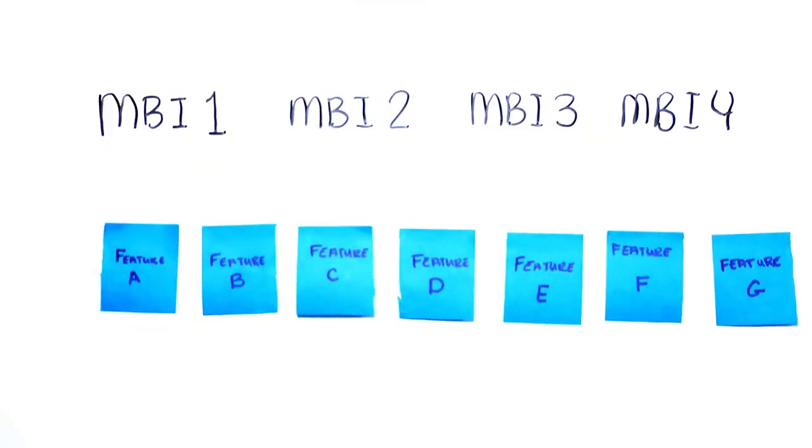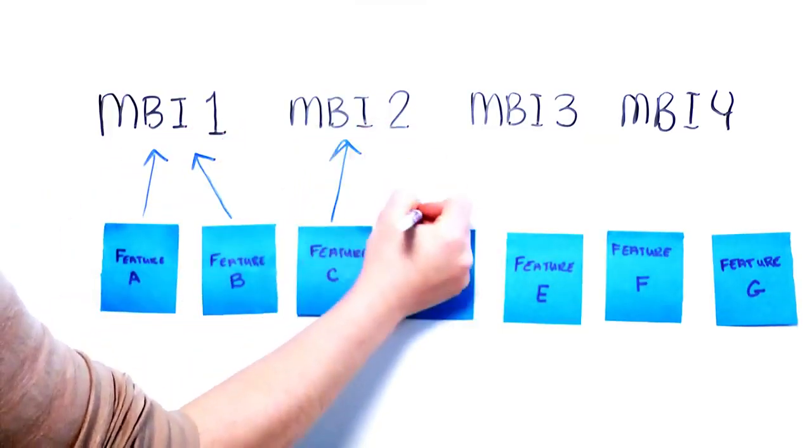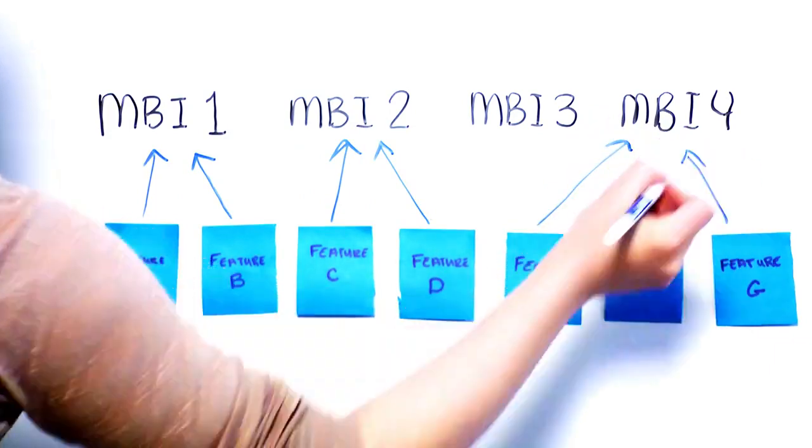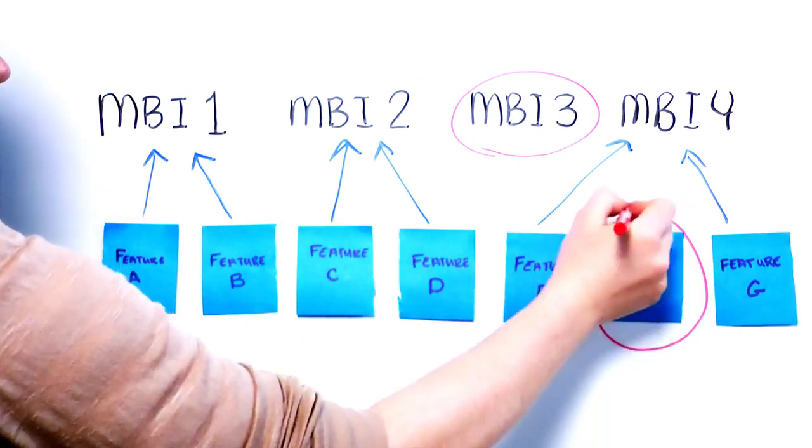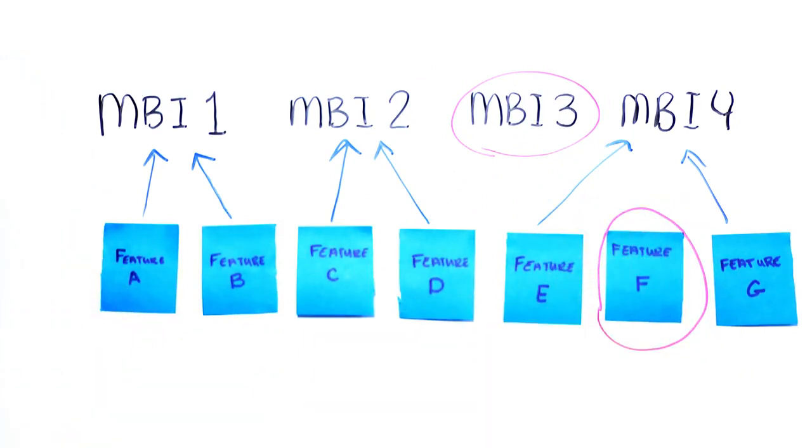We discovered a few gaps. There were MBIs without features, there were features without MBIs, there were features which were far too large, and features that were really user stories that should be subordinate to other features. We used sticky notes in a contrasting color to draft the missing features and added them to the board.